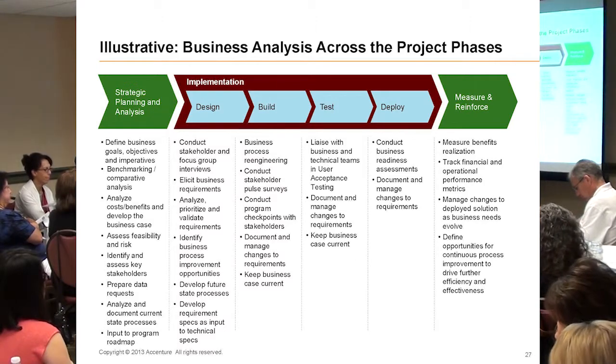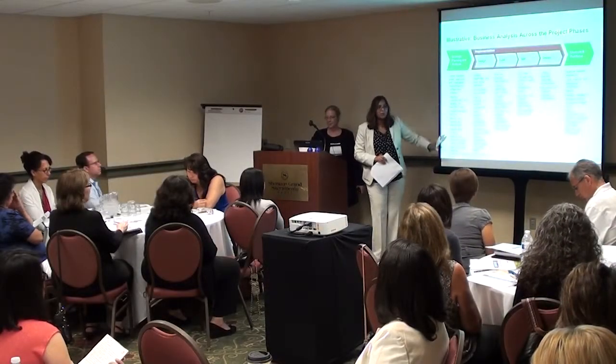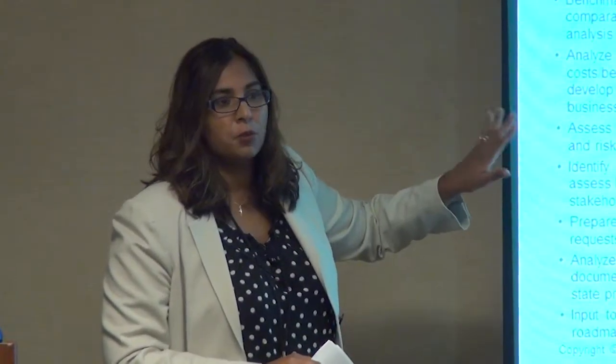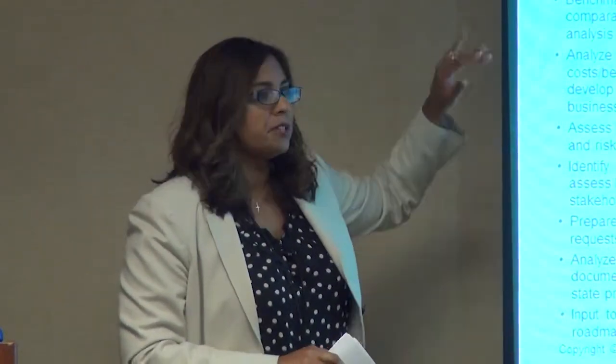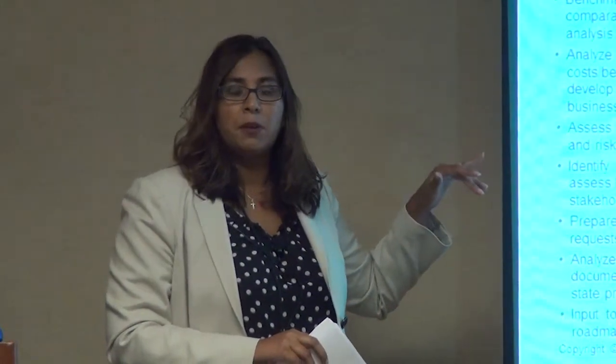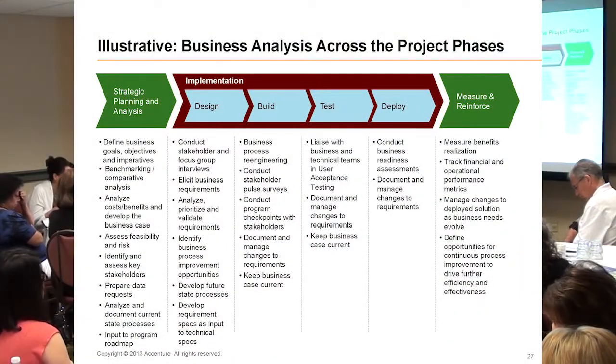At the beginning of that is what we call strategic planning and analysis, and this is where I love to work. This is great, great stuff. This is the upfront assessment. Why are we doing this? Should we do this? What are we addressing? What are our business drivers? What are we setting out to achieve? Understanding the costs and the benefits associated with taking this on. How long will it take us to do this? What's the payback period? When do I start seeing my benefits? And then assessing that feasibility and risk.